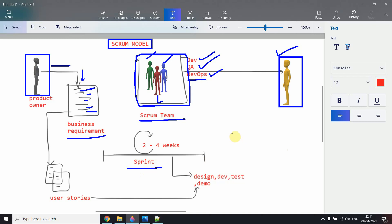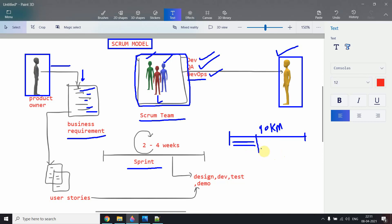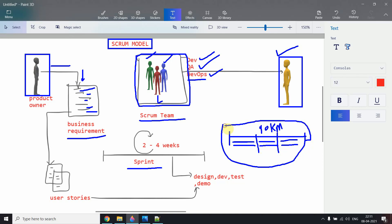To understand what a sprint is, think of a metro bridge construction over 10 kilometers. Workers don't build it all at once — they first build one section and get the metro running on that section while continuing. Then they build the next section, adding the second track, then complete the remaining area. That entire bridge construction is like an epic, and each small section built is like a sprint.